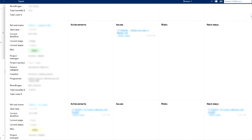Now save the page and check out the report. It gathers the project data as an excerpt from the project page, meaning if the data is changed, the report will reflect the change. It also gathers the blog posts related to the project and puts them into columns accordingly. If you remove the hard-coded UI text like 'created by,' 'no blog posts found,' and similar clutter, this report looks quite good.